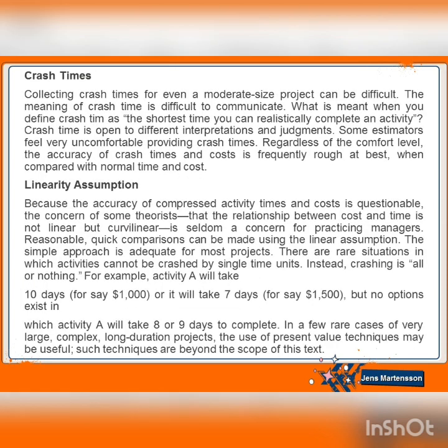Crash times. Collecting crash times for even a moderate-sized project can be difficult. The meaning of crash time is difficult to communicate. What is meant when you define crash time as the shortest time you can realistically complete an activity? Crash time is open to different interpretations and judgments. Some estimators feel very uncomfortable providing crash times. Regardless of the comfort level, the accuracy of crash times and costs is frequently worse, at best, when compared with normal time and cost.